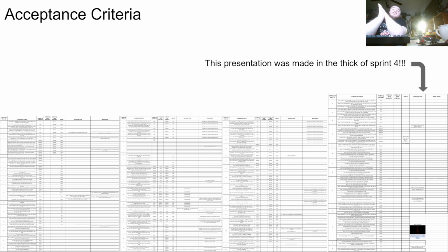Now, we usually have our code freezes on the second Wednesday of each sprint, and that way it gives the acceptance tester enough time to get through acceptance testing, which is quite a bear. So we are currently in the middle of sprint 4, actually near the end of it, but as you can see, here's the acceptance testing done by Steven. And then, of course, someone else tests Steven's criteria. For ethical reasons, of course.